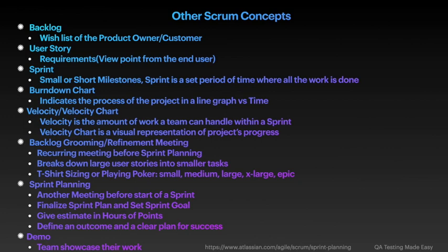For the same ticket, Scrum Master will ask QA to give her estimate. She might say 5 hours since she needs to test across multiple platforms, browsers, and devices. The same process will be done for every single user story until the team finishes estimating all the tickets or they reach the 2-hour mark. One point to remember, Scrum Master and product owner should not give any estimates.